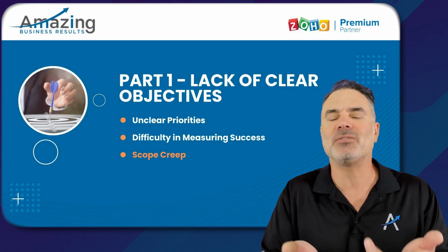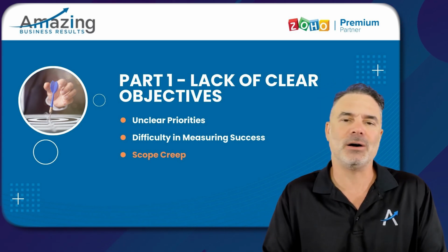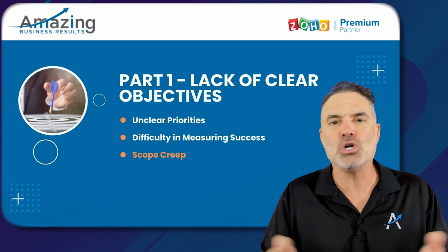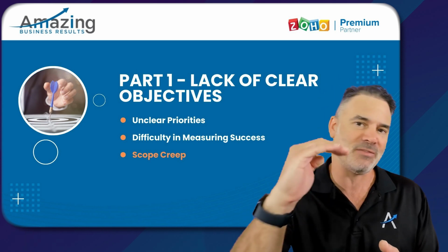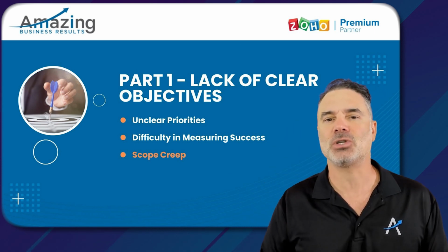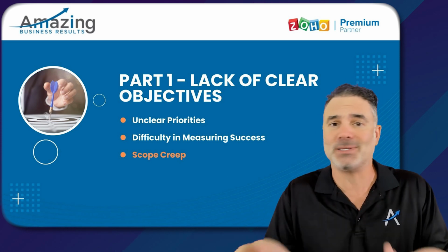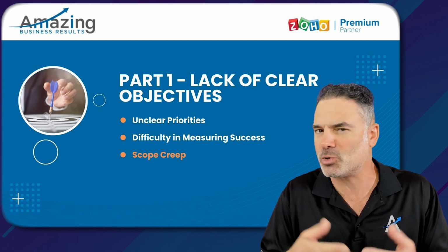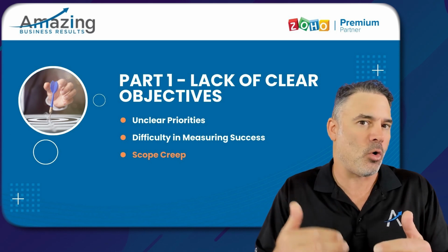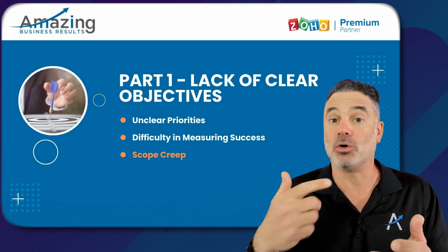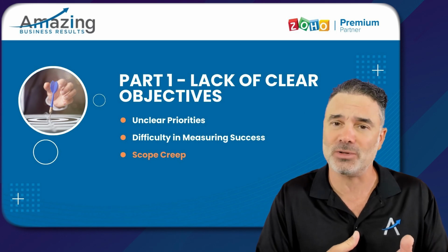So to me, it doesn't make sense. So when I deliver the system to you, you will say, Lior, the system sucks. It's not merging automatically, and there is no integration with Facebook messages. When a Facebook message comes in, a message is not created automatically. And I would say, but it's not part of the specification documents, not what we discussed. So then I will say I need to have a scope creep. I need basically to have more things done, and I will charge you more for that, and you will be unhappy.